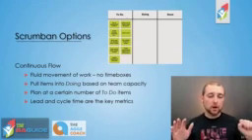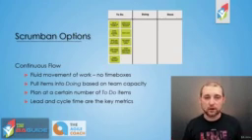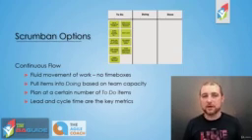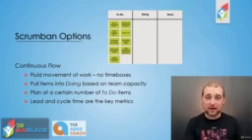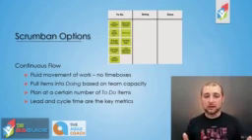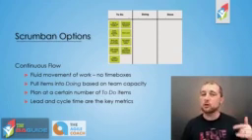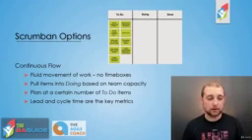You're also going to do your planning when your to-do list gets down to a certain number of work items. So you may have a rule that says, hey, when our to-do list is less than 5 work items, we need to plan additional to-do items, additional features and functionality that we're going to be building out as part of this project. You have that, so then it triggers that planning action, because when you're doing a continuous flow, you don't have those set starts and ends where you're really identifying that. So when you hit that certain number that you've set, then you go in, you plan, you add those additional user stories, work items to your Kanban board.